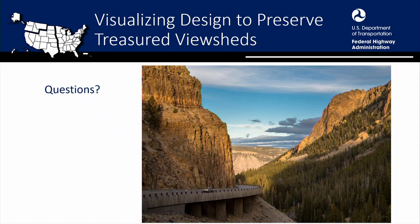We were also trying to figure out, do we have the capability to do this internally? So we have LumenRT, we've used it a little bit. It's not nearly as detailed as what we got this way. We learned very quickly that no, we don't have the capability to do this ourselves. With how much time went into developing it and all of the software that we just don't have, it made more sense. It makes more sense for us to go outside in the future as well, if we're going to do more. And we have used LumenRT for some similar efforts going from OpenRoads.